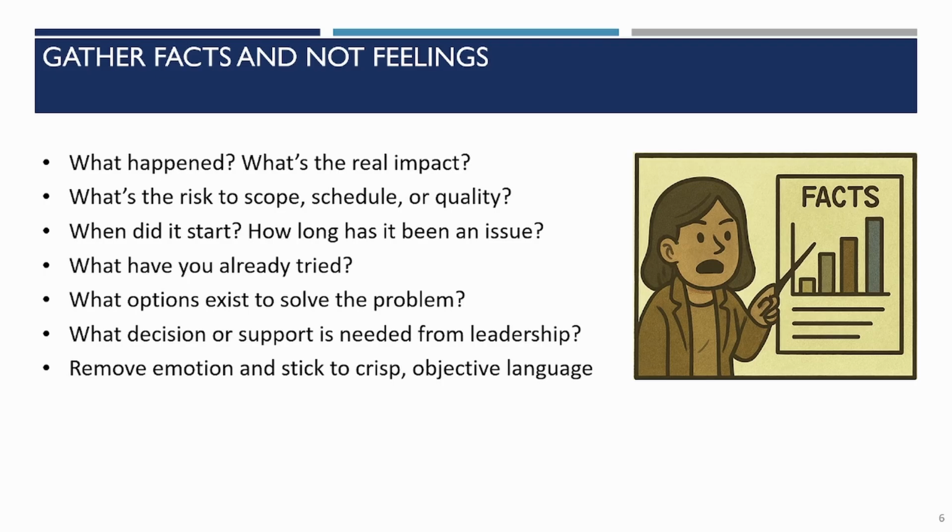And in that case, you want to gather the facts as much as possible. So what happened? What's the actual impact? What are the risks to our scope or our schedule or some of our deliverables? When did it start? How long? What have we tried, and what options exist to solve the problem? Which then gets to what support is needed from leadership.